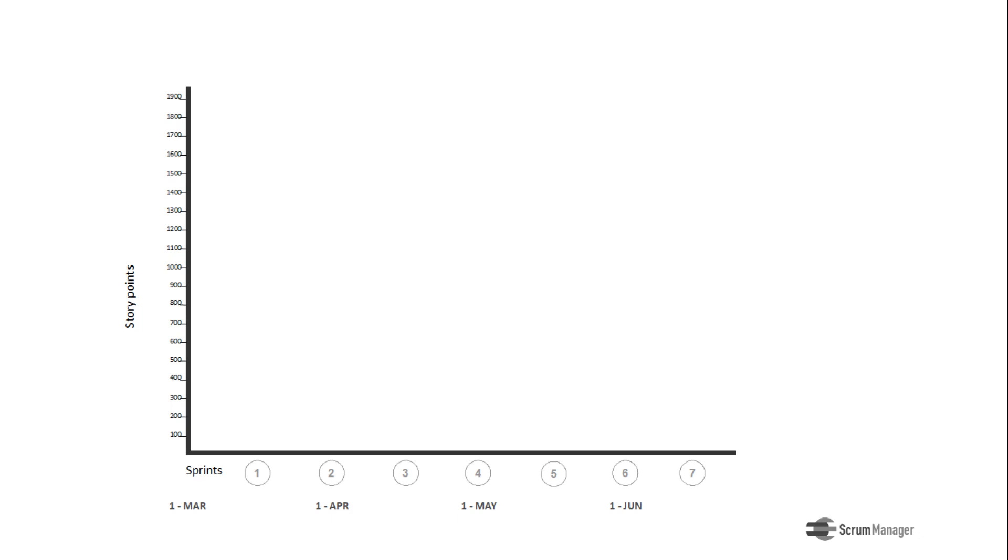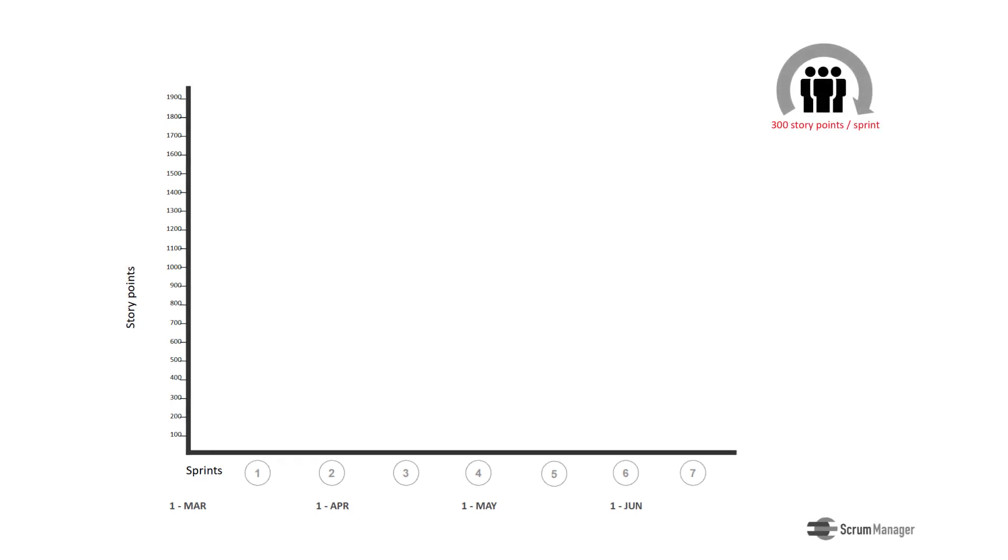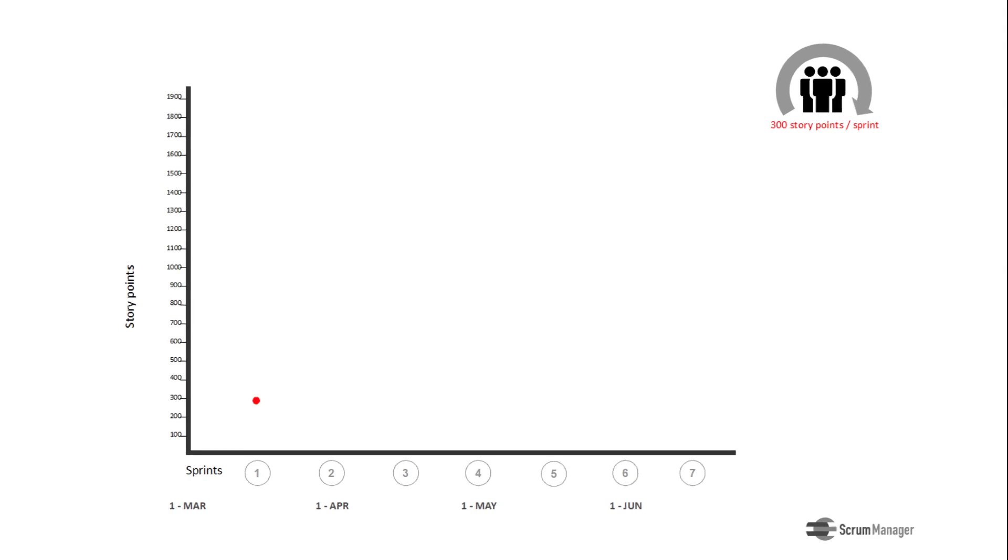Let's see below how this graph is constructed. Let's assume that we perform two-week sprints and that the average speed of our team is 300 story points. That means that on each sprint we develop tasks that require an effort of 300 points on average.